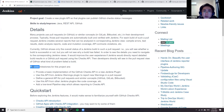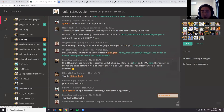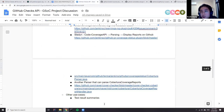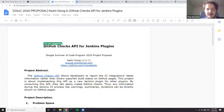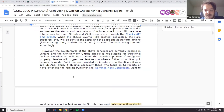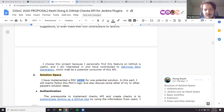I have written some deliverables in my proposal, but I'm not sure whether those can be implemented or achieved exactly as listed — can those deliverables be discussed and changed later? What you do now is write a project proposal, and we totally understand that we cannot commit to the scope right now because that proposal may change. The environment may change and there may be obstacles that get discovered. During community bonding, we usually ask project teams to work on a mini design based on the original proposal, so you review the proposal together with mentors, see what could be done differently, what needs to be done, and what the order should be.